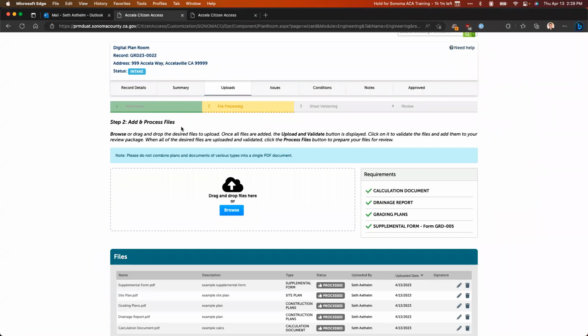So at this time, the customer does not have the ability to remove those. The easiest way to represent that would be to leave those sheets in, but potentially put them as blank or put an X so the reviewers know that those are to be removed. The reviewers do, in fact, have the ability to discard those sheets if there's anything being removed as part of the process. Okay, and are you covering here, because we're still in the submittal part here, a way to just delete the entire set and then you could add another set with the reduced number of sheets at this point, right? That's still an option? It is an option, and we can hit that at the resubmittal phase here in a little bit.